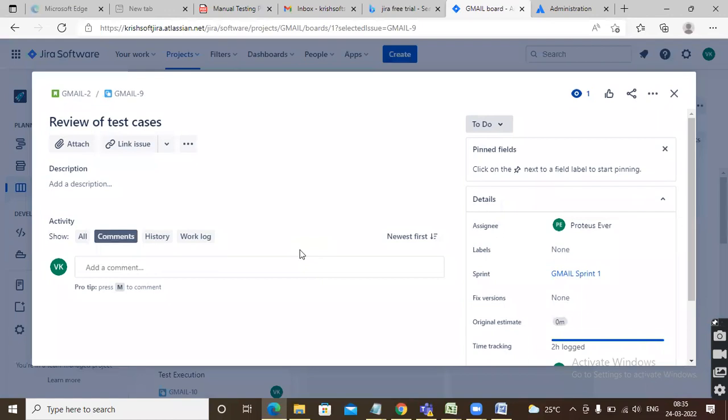That is how it is going to work, guys. So 6 hours logged successfully. If somebody pulls the report, whether you are burning or not, some reports I will show you later. In the report, it will show how many hours you are burning daily and what stories you are working on. Your Scrum Master or anybody in the team can do it. So burning the hours is a very, very important task, guys.